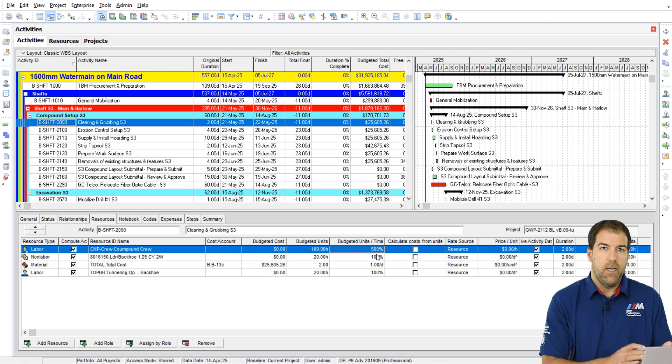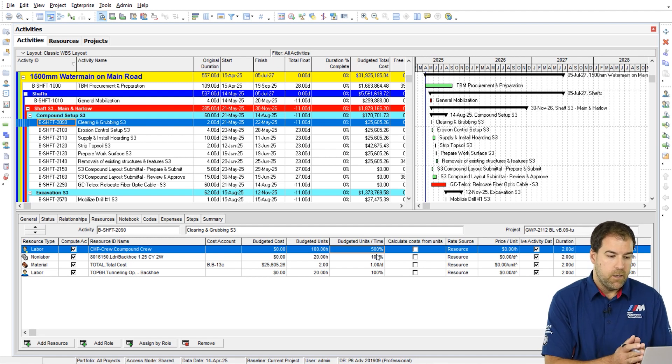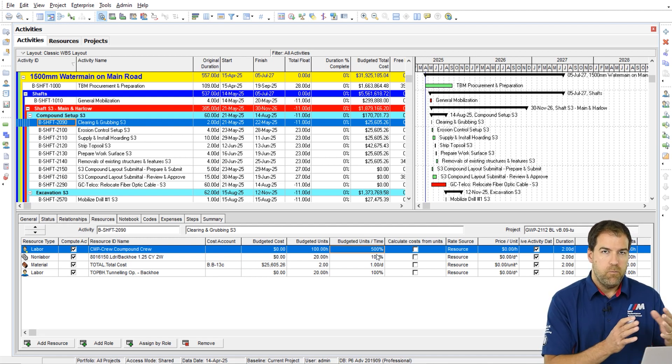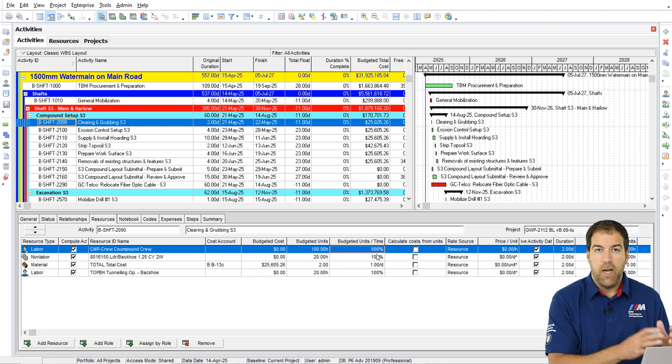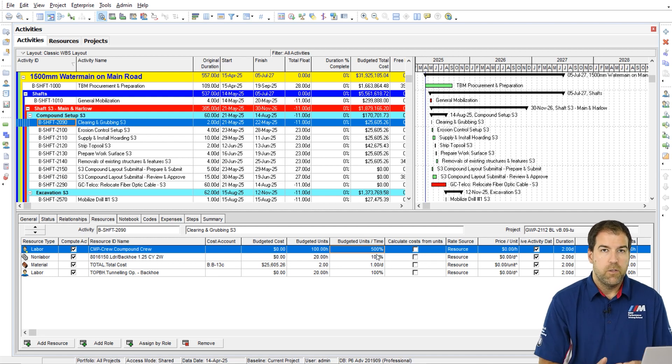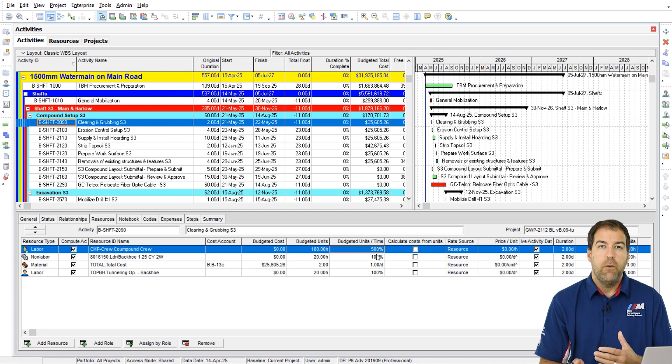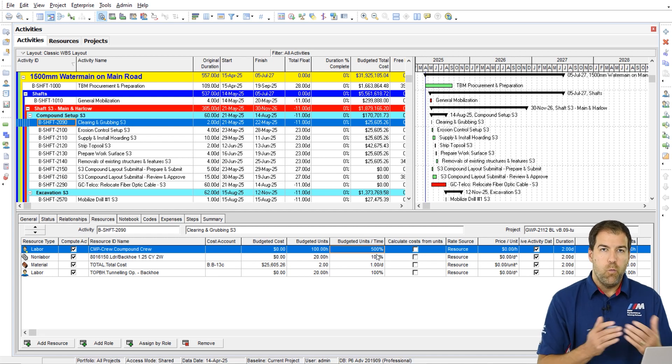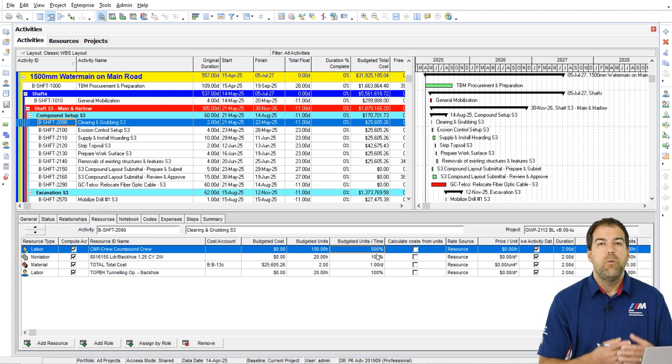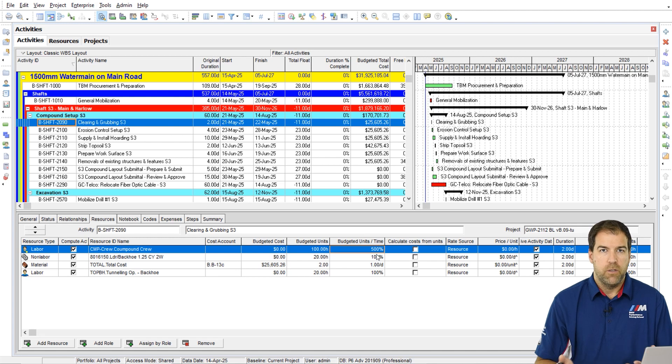Well, it's kind of nice actually to see it as a percentage because what that means is I've assigned potentially five people from this crew to this activity because it's 500%. And we would assume that 100% would mean that there's one person assigned to this activity.